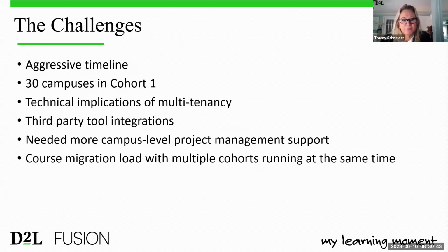And I'll just add that we did not plan enough project management support for the campus implementations overall. So our vision was to do small group cohort style implementations to keep the costs down for SUNY and have the SUNY DLE own a large part of the rollout and enablement. But with our tight timelines and having so many cohorts all in implementation at the same time, it quickly became a lot of work to do in parallel.